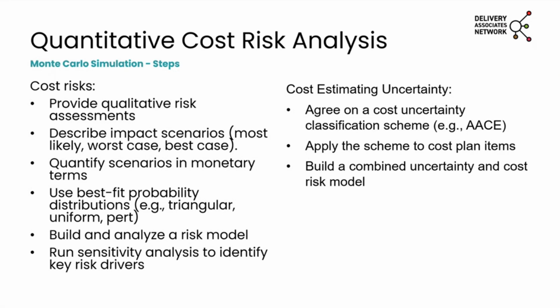So you put it in a software. @Risk is usually used for quantitative cost risk analysis, except if you want to build a combined model with schedule, which I'm happy to touch upon, which software I personally recommend. @Risk is a simple Excel add-on, which solely does cost. And basically in Monte Carlo simulation, you can repeat the project multiple times. Each time, randomly, each risk event does or does not occur based on the probability we input, and the cost of various activities or materials falls in a different place within distributions of the uncertainty. So that's how we take risk and uncertainty into account.